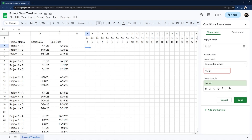I'm going to use AND because we need two conditions: we need to know if this date is after the start date and before the end date. So I'll use E with a dollar sign on row 2, because I want it to change columns but not rows — the dollar sign locks that row. Then I check if it's greater than the start date locked at column B row 3. If you need more help with this, I'll link to a conditional formatting video in the description.